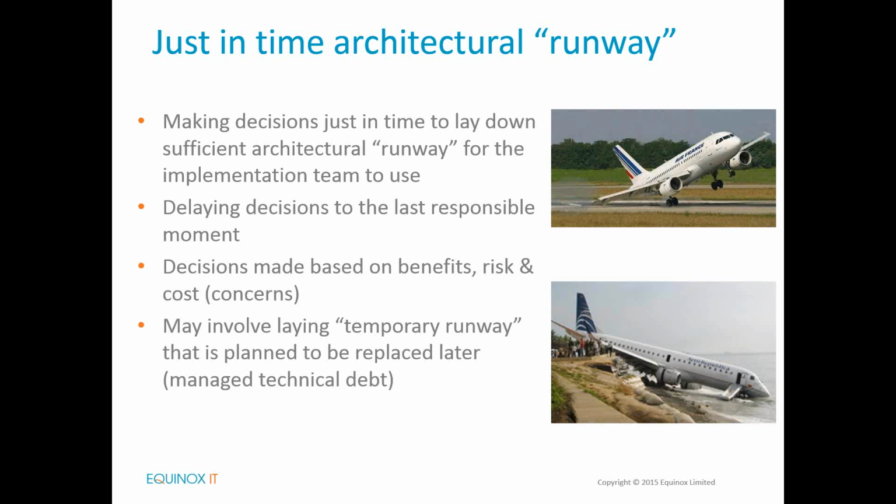The decisions are based on benefits, risks, costs, and other concerns. And in some cases, it may even involve putting down temporary runway, where you recognise that we're making potentially a decision that we may change, but it's recognised as such, and it's recognised as potential technical debt, and you can have a strategy for managing that technical debt.